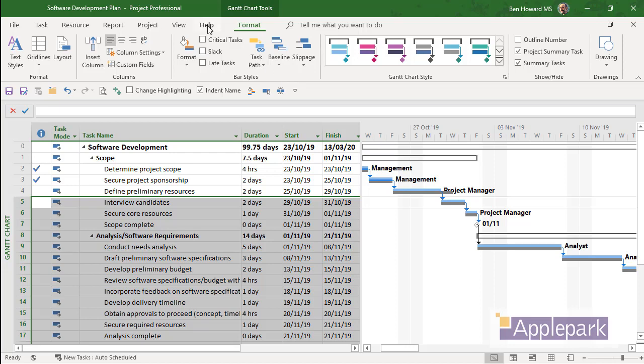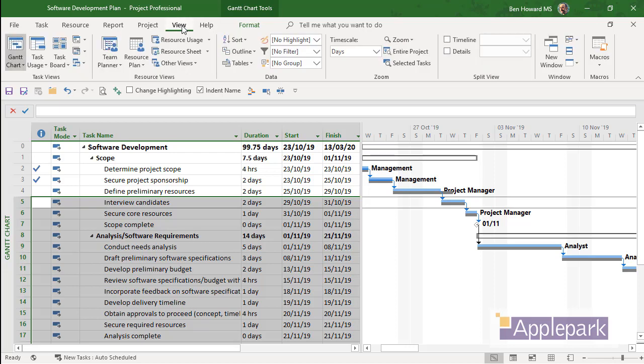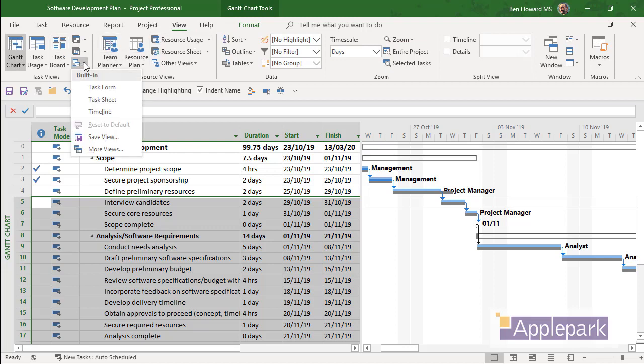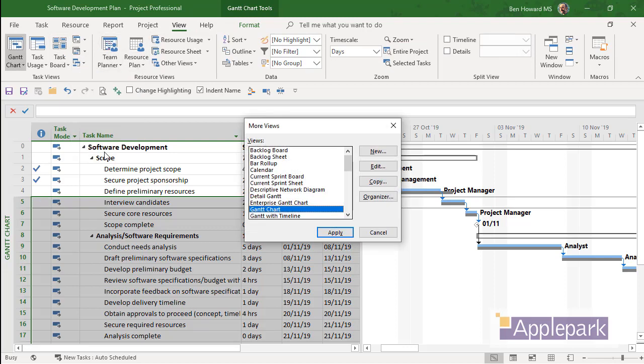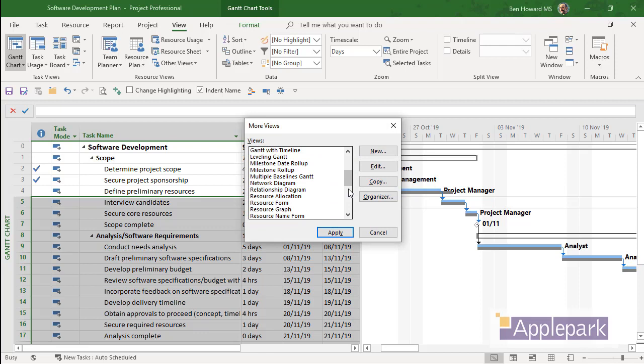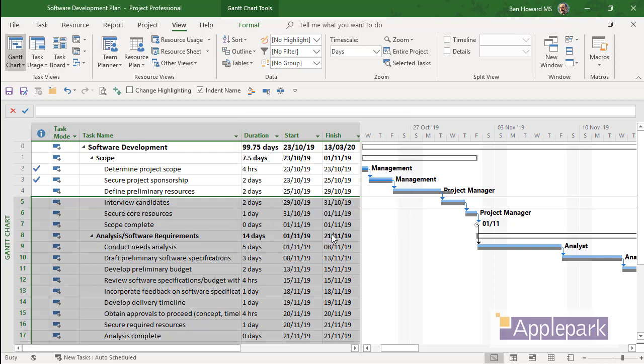Well, from here we click onto View, and then More Views, and we can go and select the Multiple Baselines Gantt chart. We could either edit this directly, apply and edit it, or of course we could copy it and then modify the copied one. I'm just going to apply this one.